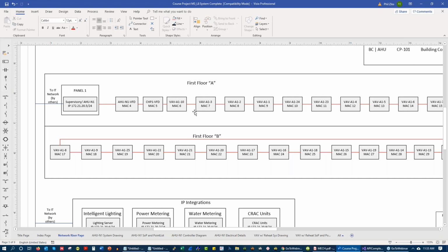By doing a quick glance and then addressing in that order and then updating my drawings with an updated accurate address, it's going to cost you a little time up front, but it's going to save you much more time in the long run, because you are doing essentially a point-to-point validation.